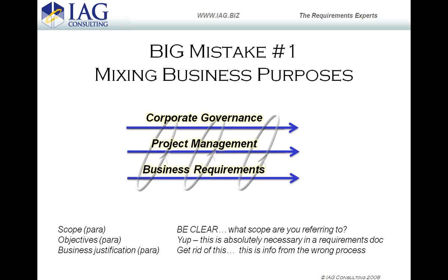And you need to be very clear about which one of those two you're referring to. So to answer Jamie's question, what do I mean by the difference between these two? Scope of the project includes many things. It includes the initiation, the activities of design, development, build, test, rollout, train, all of those basic activities associated with doing the project, as well as the activities associated with managing the performance against governance and the time and cost and things like that.